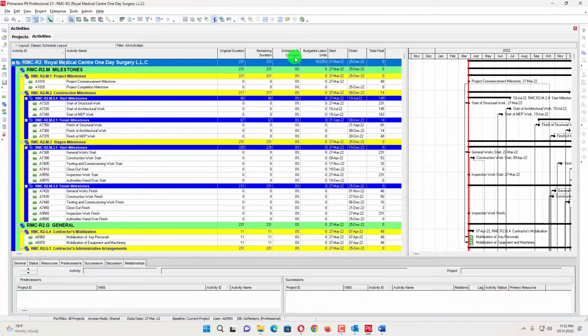That's based on the time, or the data date comparison with your project plan date. So how much is your total project time, what is your current time, and what is your start time. That comparison results in schedule percent complete.